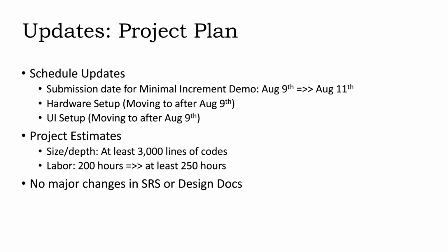Additionally, the size and labor estimates have been updated. As the team gets further into development, we are more aware of resources required to complete the game. Based on current progress, we expect the base game to contain at least 3,000 lines of code, with an understanding that that figure may increase as any additional features are added, time permitting. Mirroring the total LOC, expected labor hours have increased slightly from 200 to 250 hours, with an understanding that that figure may also increase as any additional features are added.